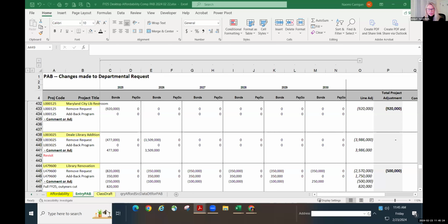And I would defer to David on status. Yeah, the park improvements themselves are complete. What we're doing now is working on the design and permitting for the actual improvements to the Wilson House. And then FY 25 would be the construction of those improvements.